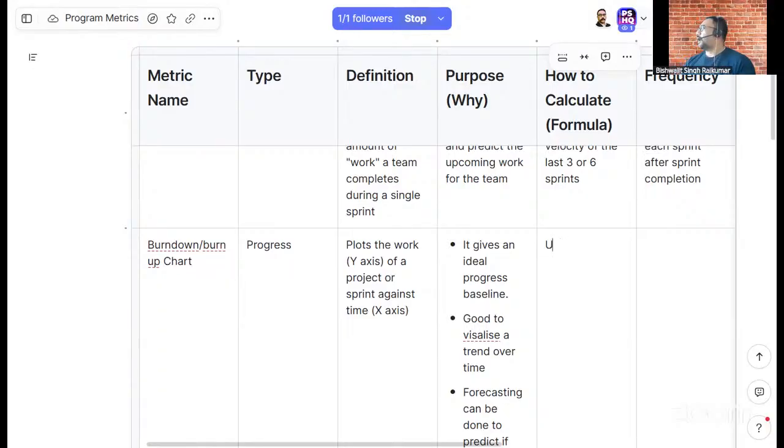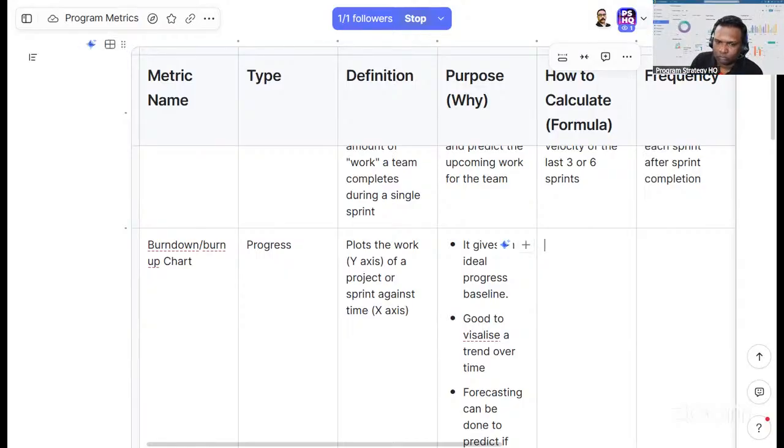I think it's simple. Take the number of story points for that sprint divided by the available working days. So in a 2 week sprint, we have 10 working days, and let's say that we have picked up 200 story points, then it is expected that every day we have to burn 20 story points to meet the target.